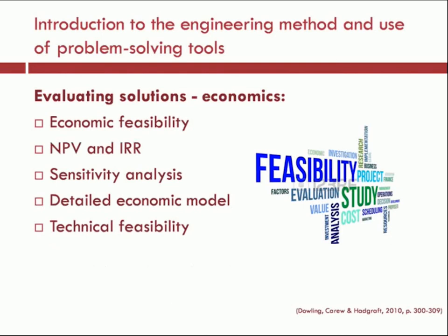So one of the ways that we can do so is through some of the economic solutions that we detail here more broadly. Now, economic feasibility just speaks to a model often prepared as a spreadsheet to assess the economic viability of the project over the life of that particular project. And we measure that in a couple of ways, either as what we call the net present value. If that number that we identify, the net present value of the particular project, is a positive number, so greater than 0, we'll consider that to be, from an economic standpoint, adding value.